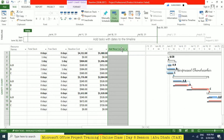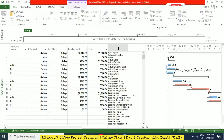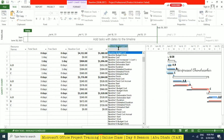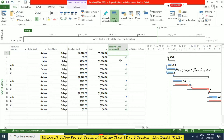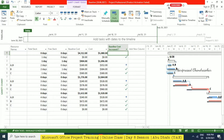Now you can select the column here — 'Baseline Cost Increased.' Can you see the indicators? Whenever it is more than baseline, it is showing an up arrow. See, if it's like 160 becoming 352, then it is more, that's why we got this indicator. If it is 384 equal to 384, then we are getting the tick mark. So like this, you can customize the columns and add indicators.